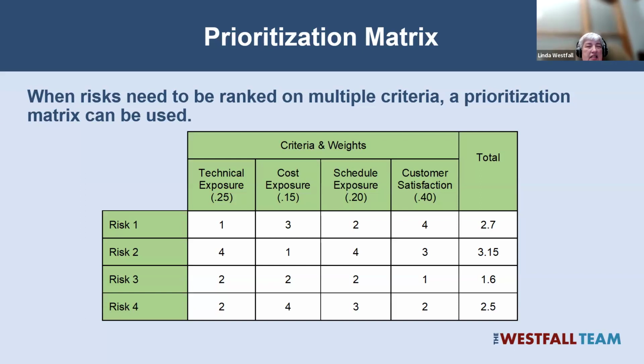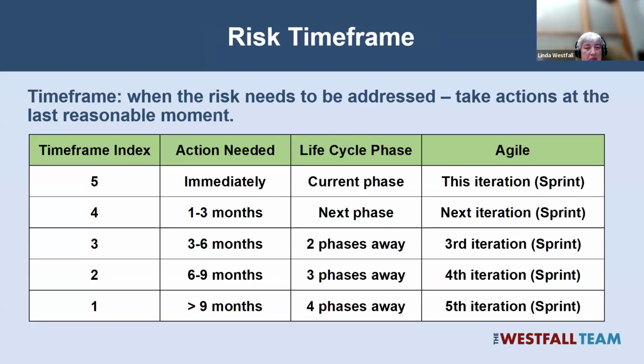So the intent of this analysis is to prioritize our risks and decide which of those risks we need to go mitigate. If the risk exposure is too high, we may want to completely avoid the risk. Most of you said, no way, I'm not getting on that board between the two 5-story buildings. On the other hand, if we could reduce the loss or reduce the probability, we may bring it back into alignment. You may be willing to try it.